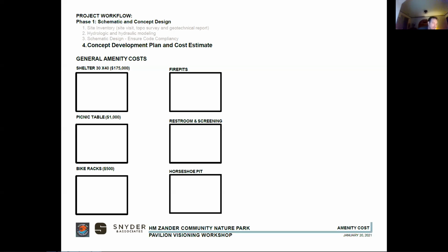But from my perspective and the Lions approach that we ended up taking and presenting to you, we gave you what we thought done could look like, and that's the vision. And then from there, we work on the feasibility, which we're doing. And then from there, you work on design, conceptual design and fundraising to drive to a reasonable or doable end product. So that's at least my thought on that.